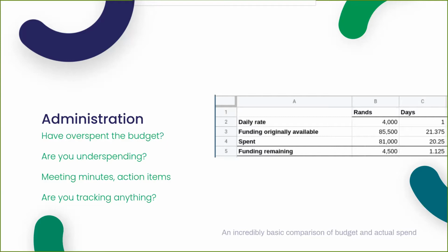It blew my mind when I was responsible for a project budget and trying to not overspend and spend more money than we have for this project. And I realized that it's also actually really problematic if you underspend on a project, if you're not spending fast enough, because you're running out of the time available for this money to be spent. And at some point, it's just a wasted opportunity. So it's not just overspending that you need to watch out for.